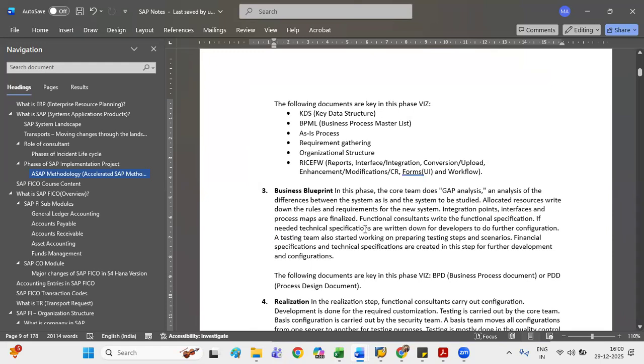Step by step. That means we are doing the work in iteration mode. First we pick the first functionality and incorporate it. The client starts testing on that. In the meantime, we work on another functionality as well. Even multiple releases will be there, multiple go-lives will be there. That comes under the agile methodology.